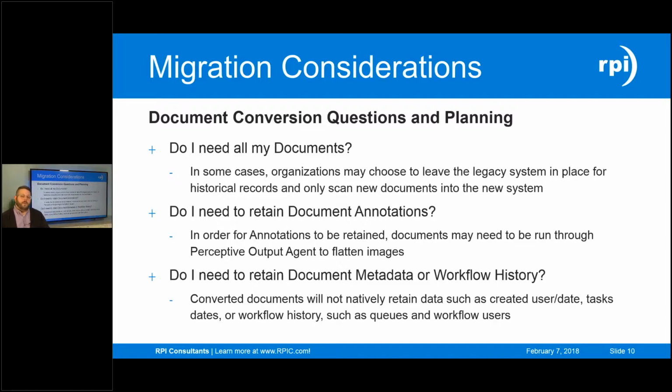However, workflow history is going to be a challenge. And again, we have some creative solutions on how we could retain that. We could append it as a page on a document. We could make it searchable via XML, maybe even plug it into enterprise search so that those documents are searchable by their workflow history. All that being said, those are things that we would need to really deeply analyze and identify if they're really a requirement, because that's going to up the level of effort pretty significantly.